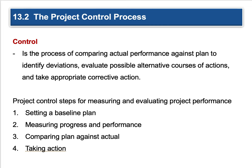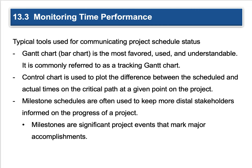For monitoring time performance, the two typical tools are the Gantt chart and the control chart. The Gantt chart is a bar chart, the most favored, widely understood tool, commonly referred to as a tracking Gantt chart. A control chart is used to plot the difference between the scheduled and actual times on the critical path. The Gantt chart has been the big one for this course. Milestone schedules are often used to keep distant stakeholders informed of project progress — milestones mark major accomplishments.